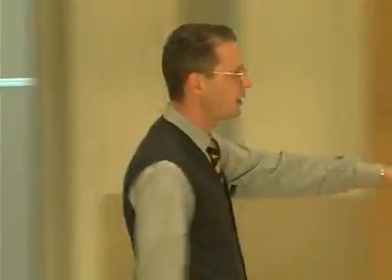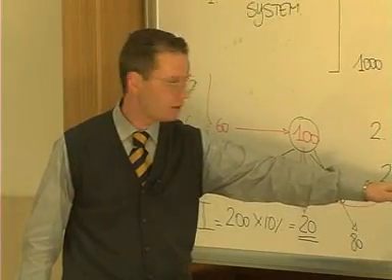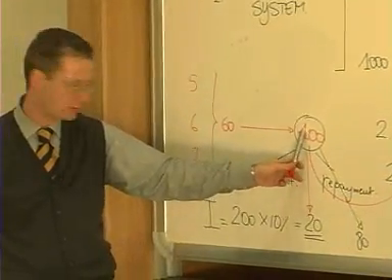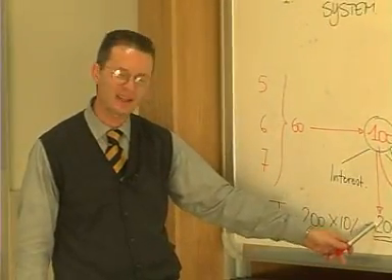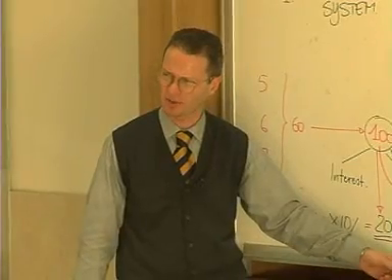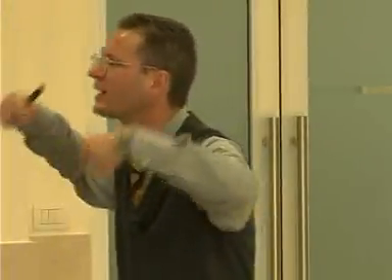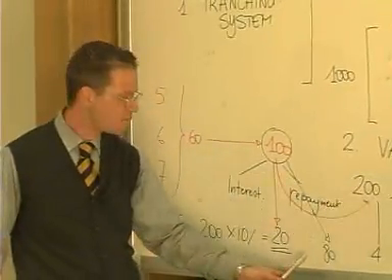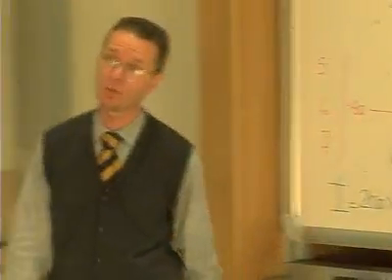Which will be the final outstanding amount at the end of year number 5? The outstanding amount after 1 year. The original amount of the loan has been 200. I have generated cash for 500 and value-added tax of 100. 100 has been split into 20 interest repayment and 80 capital repayment. What is the outstanding amount at the end of year number 5? The amount of value-added tax that must be reimbursed in year number 6 and year number 7 is 120. It is 200, the original amount, minus 80 principal repayment, and so 120 at the end of year number 5. Sufficiently clear?